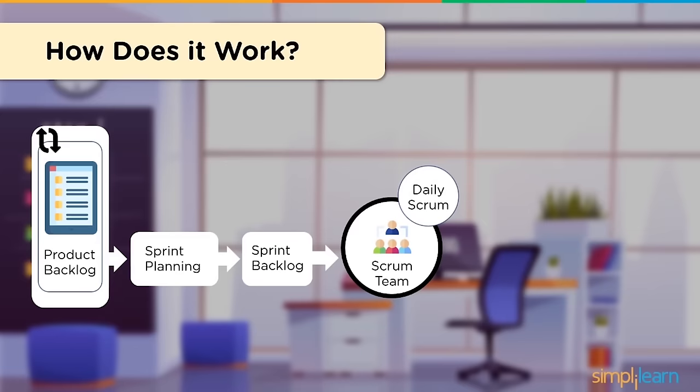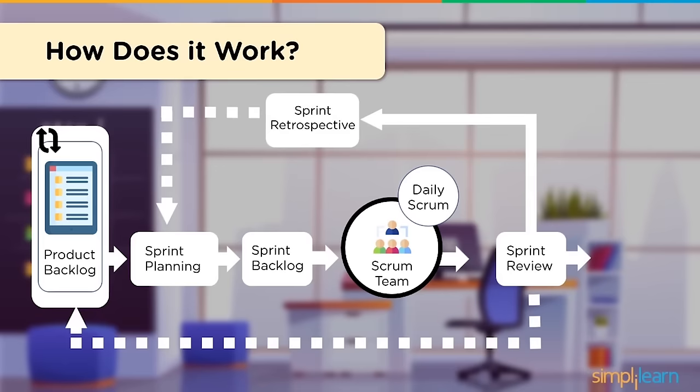And then they have the sprint review. The sprint review is a meeting during which the team shows what they accomplished during the sprint. Now, during this time, questions are asked, observations, feedback, and suggestions are made. The product owner also gets feedback for upcoming sprints from stakeholders.